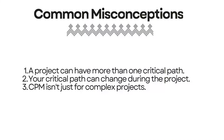Let's clear up some common misconceptions about the critical path method. Firstly, a project can have more than one critical path — if multiple paths through your project network have the same duration, they're all critical. Secondly, your critical path can change during the project, as activities finish early or late, what's critical can shift. Thirdly, CPM isn't just for complex projects — even simple projects can benefit from understanding which activities drive the schedule. And finally, Gantt charts and critical path networks are essentially two different ways to visualize the same information, and modern project management software can easily show both views based on the same underlying data.